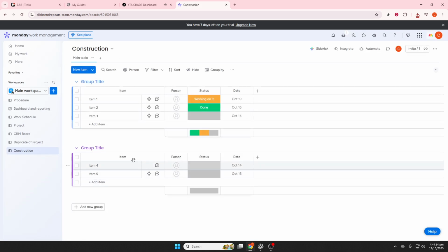Next, utilize the timeline, Gantt, or calendar views to visually monitor your project's schedule. These views provide a clearer understanding of how tasks are laid out over time. Using dependencies is crucial here, as it means when one task shifts, related tasks adjust accordingly. Additionally, the workload view can be helpful in identifying if any team members are overloaded, allowing you to balance the workload across the team efficiently. Setting up dashboards that consolidate data from multiple projects can offer holistic insights into statuses and budgets.